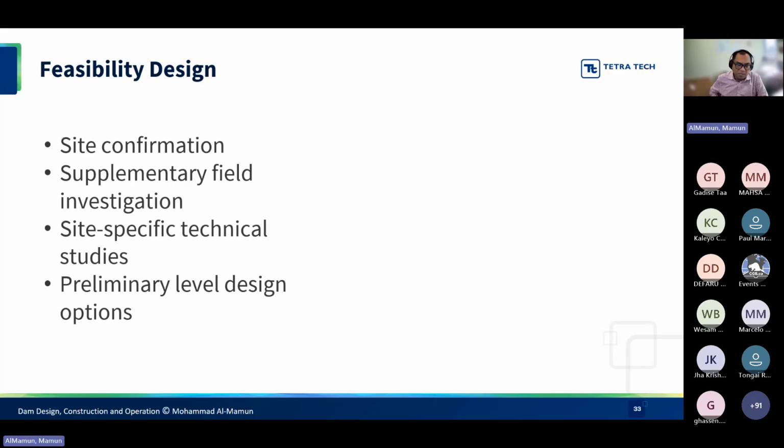It could be 50% plus minus in terms of cost estimate or 25% plus minus depending on the project and how the project is broken down, the time scale and the complexity. But we definitely need to start to look into some level of details.